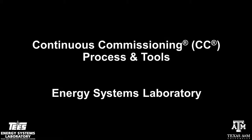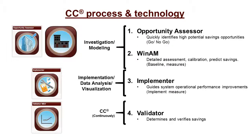The continuous commissioning, or CC, process includes three basic stages. First, we do an investigation. This is followed by an implementation stage. Then, we have ongoing commissioning, or continued CC.